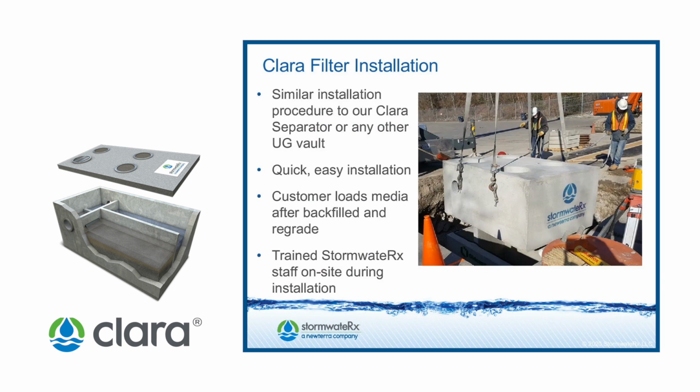Clara filter installation. Installing the Clara filter, like many underground vaults, is quite routine for our contractors and requires very little time to offload and set in place. The contractor scope includes offloading the Clara filter, excavation of the hole, setting of the Clara filter, inlet and outlet pipe connections, backfilling, and final grading up to the unit.